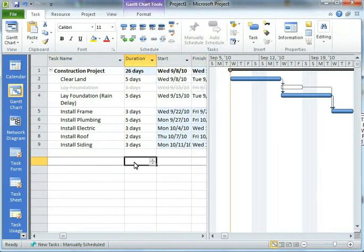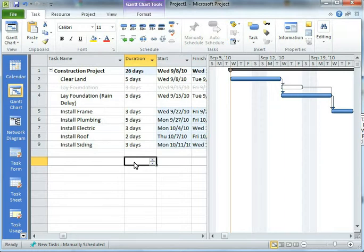The best part about this is that these inactive tasks don't affect your reports. They don't show up in your costs, your resource usage, your task usage, they don't show up in there. So it's really completely removed as far as the project is concerned.